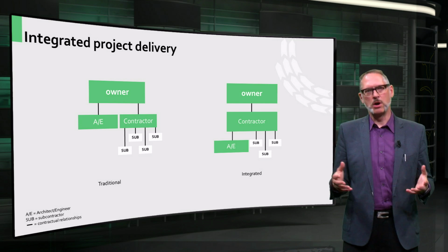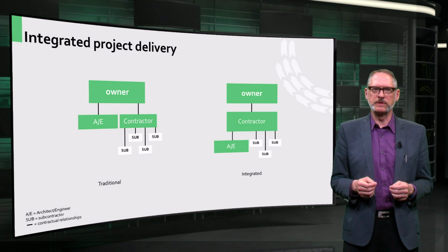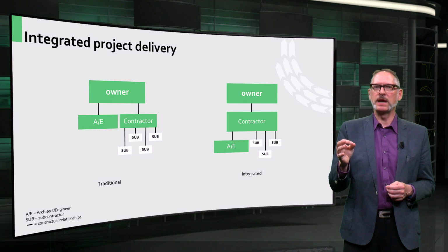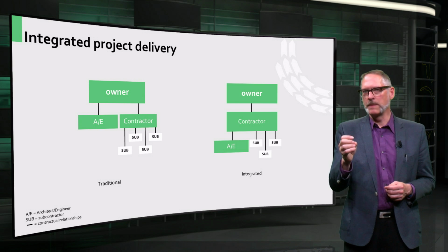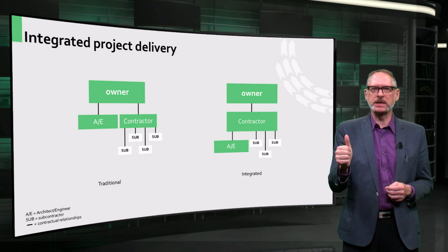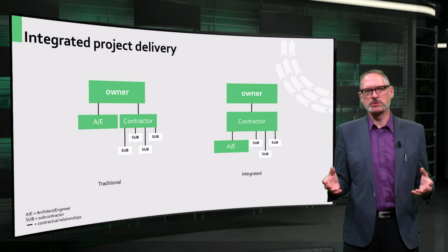For larger, often public sector projects, you might opt for an integrated delivery process in which a consortium of different actors bid to provide you with the design, construction, operation, and maintenance of the building in one package, providing single-point responsibility and better protection against cost overruns.